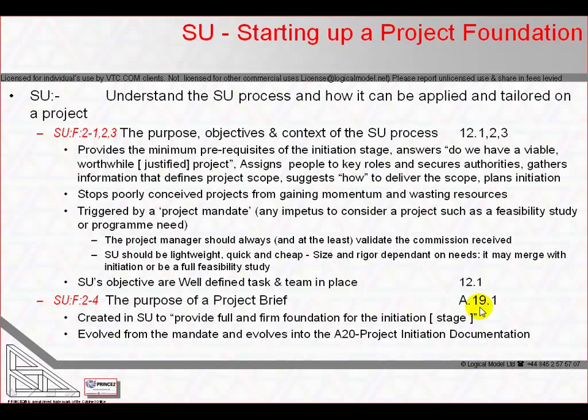The project brief is a key element of the controlled beginning. It evolves from the project mandate that triggered starting up a project, via discussion with corporate management if we're outside a program, or with program management if we're inside a program, and the project board members as they get appointed, particularly the user community, operations and maintenance staff, and potentially, if already involved, potential suppliers. The project brief must follow corporate standards and policies.